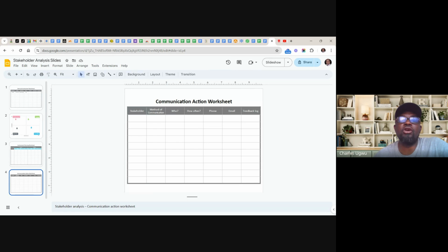Maybe a new person is coming in, you need to update your list with the name and number of the new person, or highlight that this person has left. You might not even delete somebody who has left, so that you have a history of all the people that worked within that project. But you can just highlight, maybe with a red color, meaning that this stakeholder is no longer in existence or active. So that is it about stakeholder